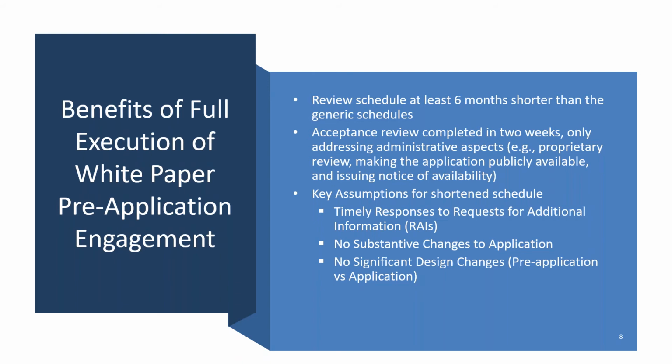Now, in order for us to be able to maintain and achieve this schedule that we will be able to offer to you due to your pre-application engagement, applicants will have to, though, one, as part of the request for additional information process during the review of your application, be timely in your responses to those requests for additional information.